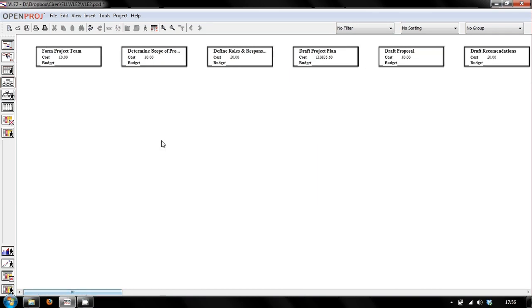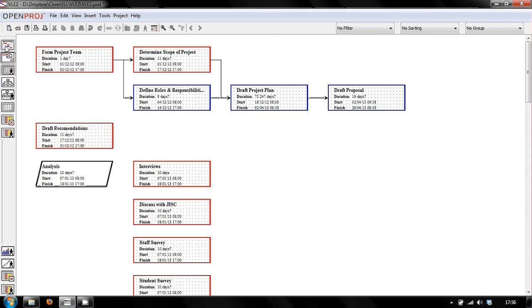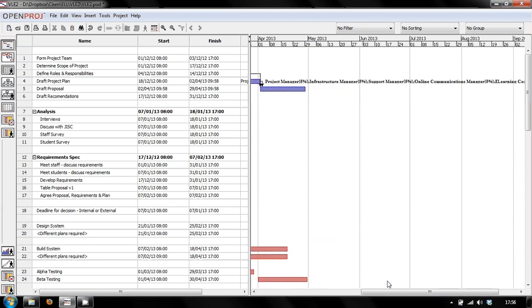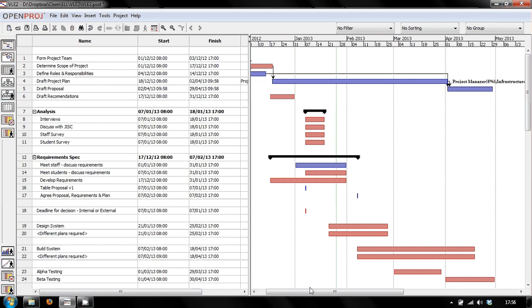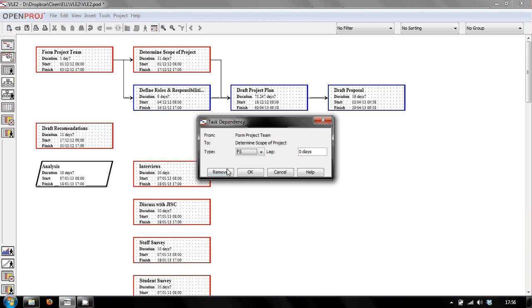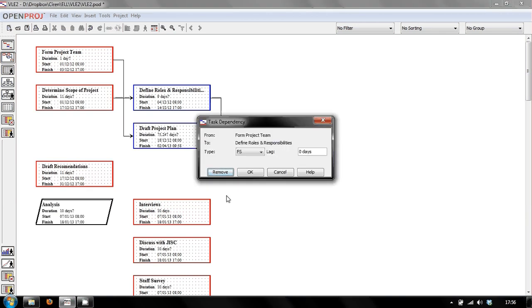So obviously that's nonsense, but I would adjust the amount of time associated. The main thing is, because of the way I think I did my critical path analysis, the start and the end dates don't match up, so that's why it's automatically rearranged my Gantt chart. So these dates have gone a bit ludicrous because I've said that I can't do that one until that one's finished, and I can't start that one until this one's finished. So what I would then do, I guess, is unlink all my critical paths here, and then put my dates back to normal.